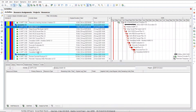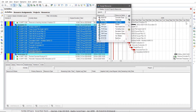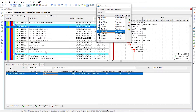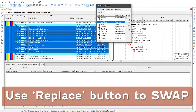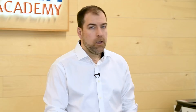What are these buttons I'm talking about? We can use the add resource button down here in the resources tab underneath each activity. But what if I want to add a crew to all of these activities? I can highlight and use these buttons on the right to quickly add my excavation crew and get it added to every activity. And if I want to swap out the excavation crew, there's a swap button — use the swap button. Swap out excavation crew for the pipe crew. The swap is done. Use these buttons; they're going to make your life a whole lot easier and let your resource loading happen so much faster.